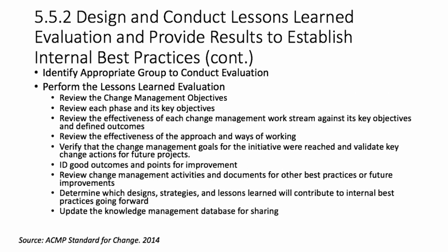You should identify an appropriate group to conduct the evaluation. Key individuals and groups affected can be identified for participation using the outputs delivered. The change management lead conducts an evaluation of lessons learned by bringing together team members, key stakeholders, the project sponsor, leadership, affected staff and customers, and other appropriate parties. You should perform the lessons learned evaluation.